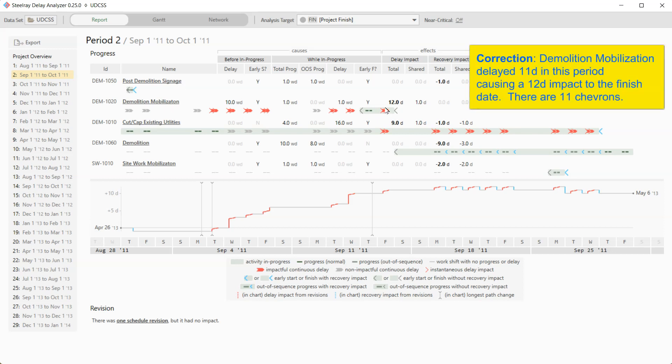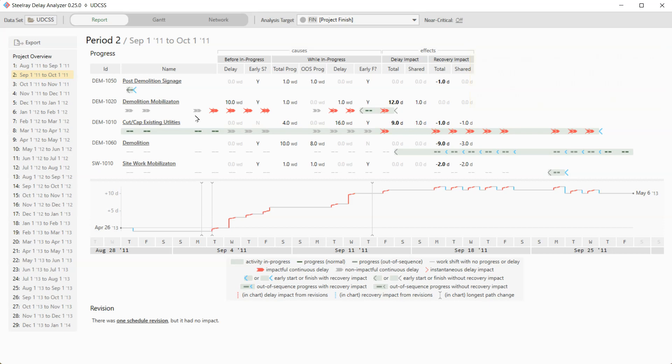Demolition mobilization, though, delayed 12 days in this period. And that's what these chevrons are representing. And you can see that there are 12 of these chevrons on 12 days. But some of them are gray and some of them are red. So what is the difference? Gray is non-impactful and red is impactful. And what we mean by impactful means it moved the finish date. So, for instance, on Tuesday of the week of August 28th, this activity delayed, but it had some positive float. It did not move the finish date. Same thing happened on Friday. Saturday and Sunday were non-working days. Monday it delayed. And it probably used up all its float because Tuesday it continued to delay.